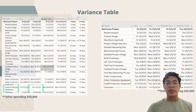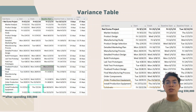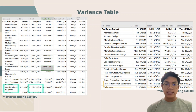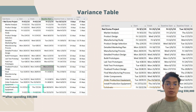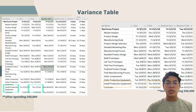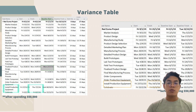There is not much difference in the tables, but the completion date for the Red Zuma project is reduced by seven days from its original date. This is due to the product equipment installation being pushed forward to 7th January compared to the previous date of 14th January 2016. The new completion date is therefore 8th January 2016, compared to the original 15th January 2016.